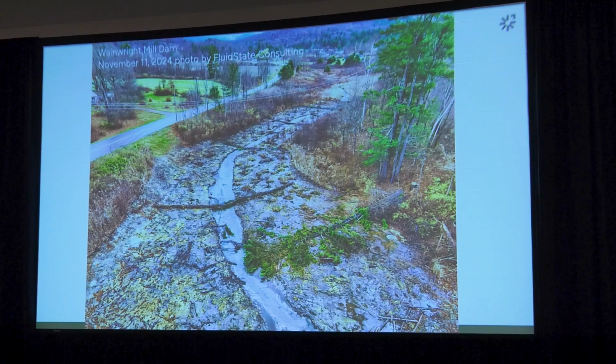And that coordination was a little difficult just because the contractor changed where they were working a few times based on weather conditions and how wet the soils were. So sometimes those kinds of things fall to us, coordinating and making sure all the different players are on board and working together.